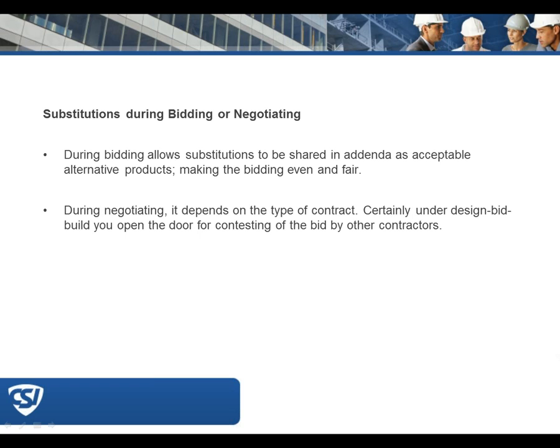I would say a couple of things in addition to what Doug has added. First, probably in the contract documents, perhaps in the general conditions, maybe in Division 1, there is an explanation of how communication is supposed to occur and who the primary points of contact are. So had that contractor read those documents more thoroughly, they'd know that it was supposed to come through the architect.